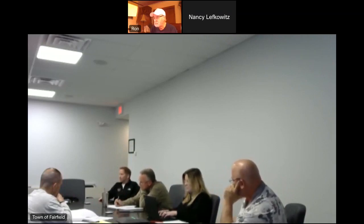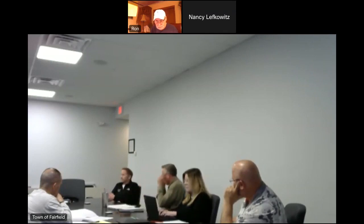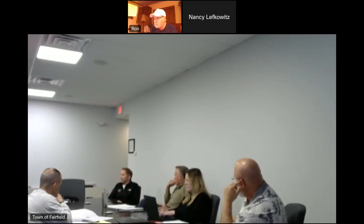So this morning, John Marsilio and I were talking, and I reached back out to the consulting firms and asked them to include the facility condition assessment and a deliverable of a recommended 5 to 10 year capital improvement plan and the rationale behind it and all that kind of stuff. I'm expecting to get that, best case, end of the week, otherwise early next week.